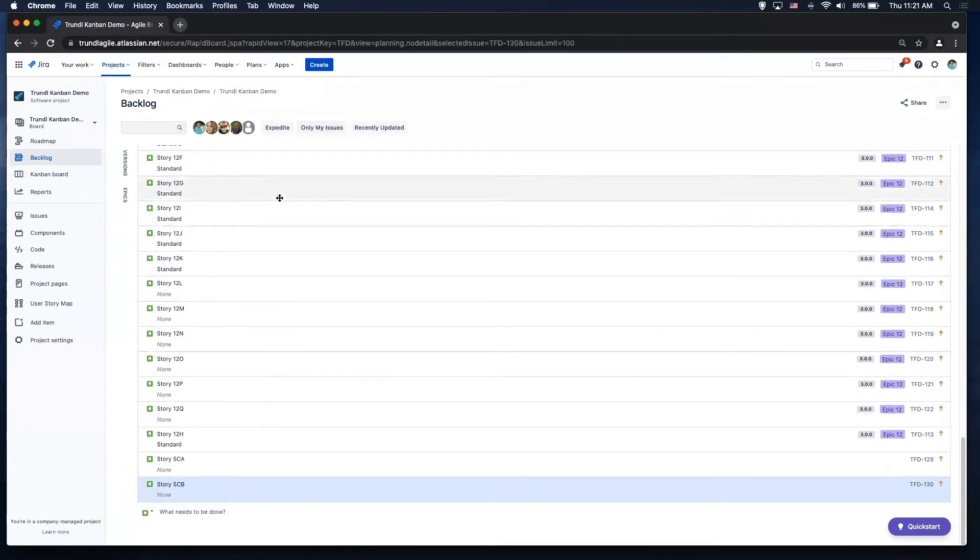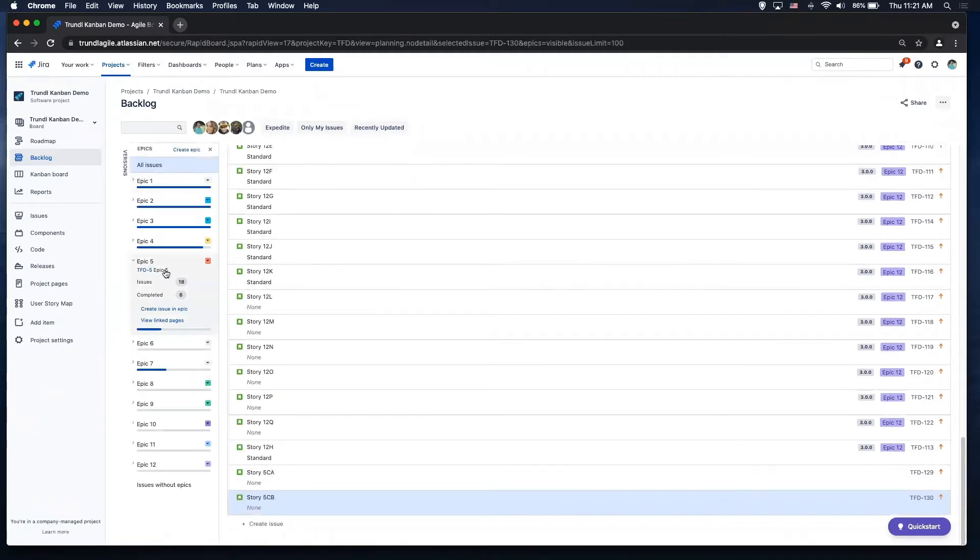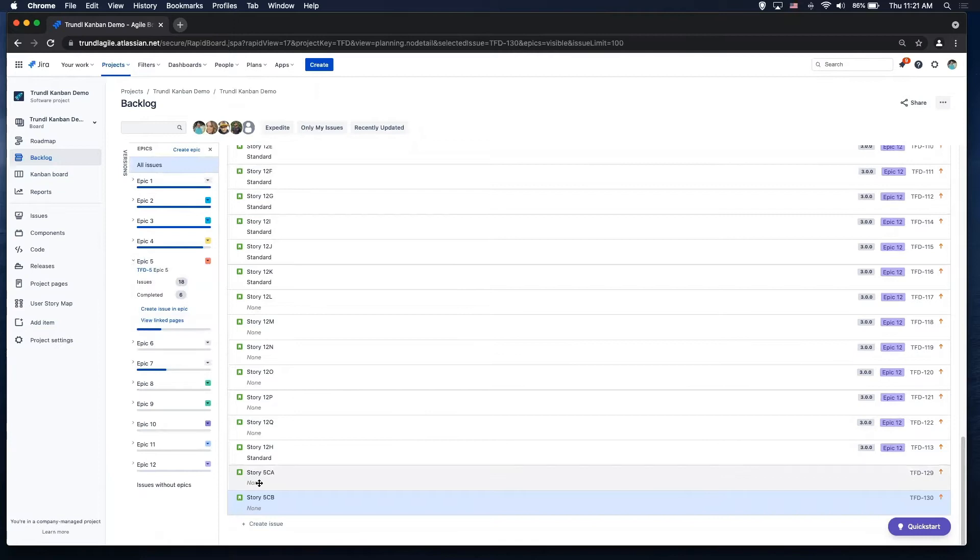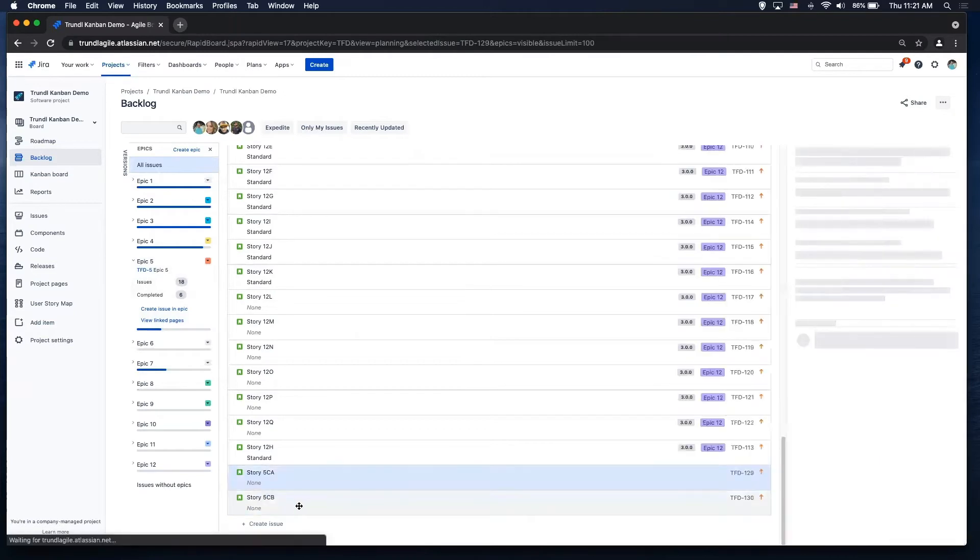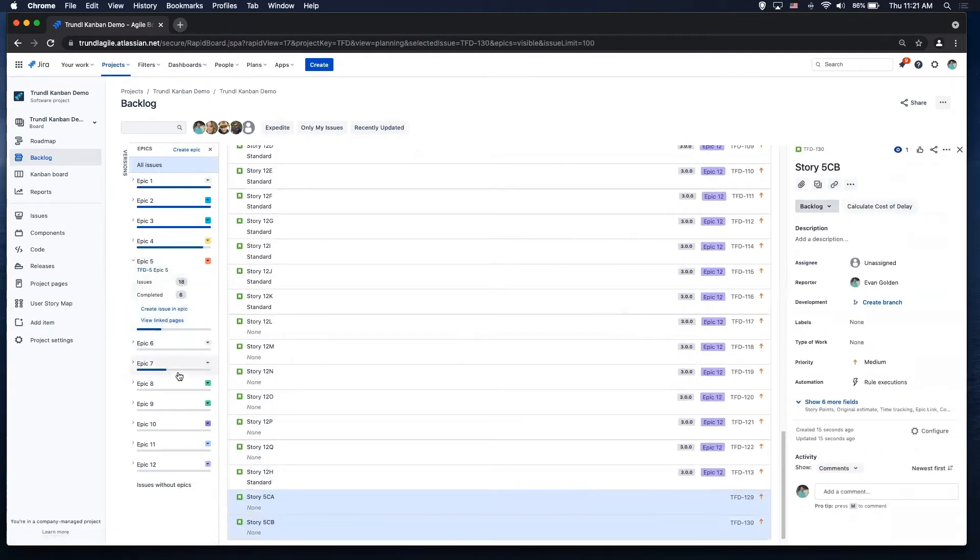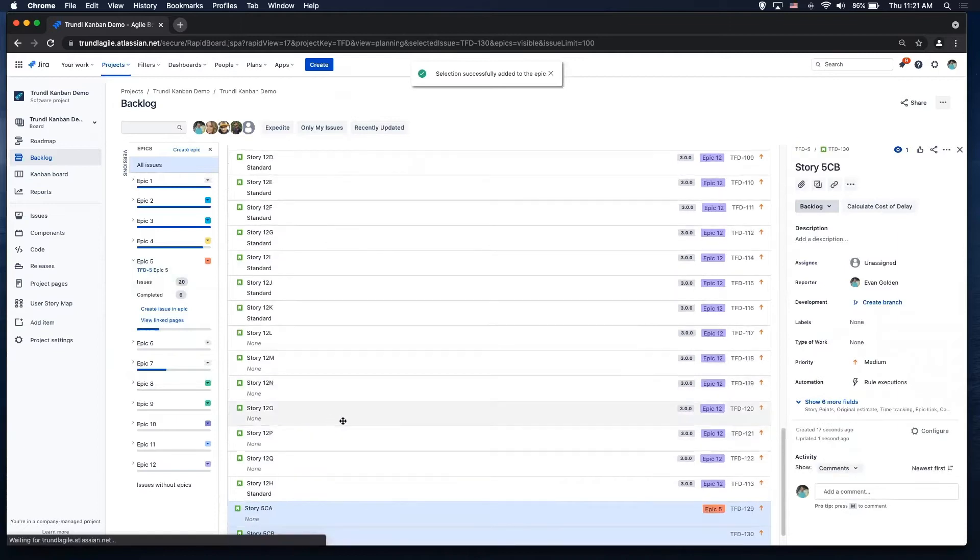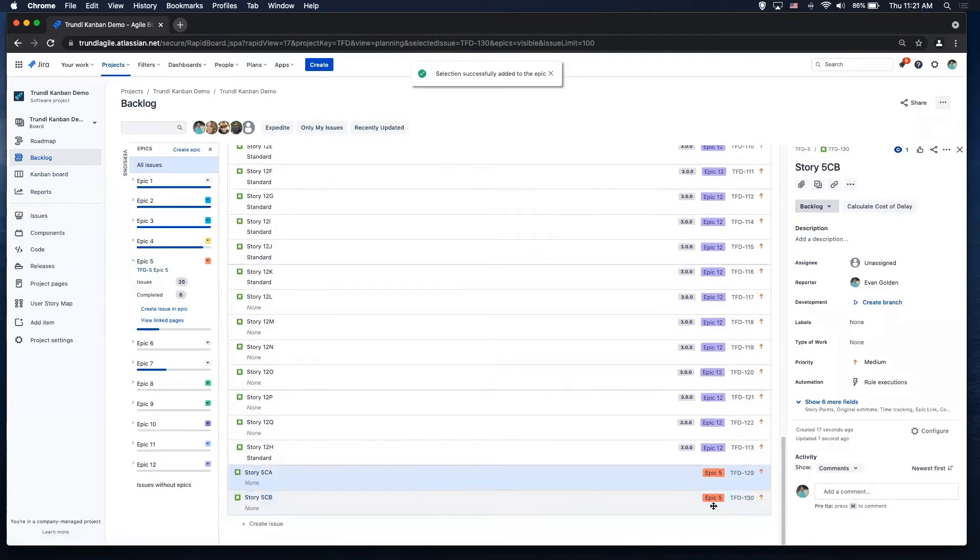And then what we have with this is our epic panel. So we have our epic panel here so we can easily link our stories to our epics. You'll see epic five, I have 18 issues, six are completed, and I can grab two of them like this and just drag them right into that epic. Okay. So now you can see it added epic five there.